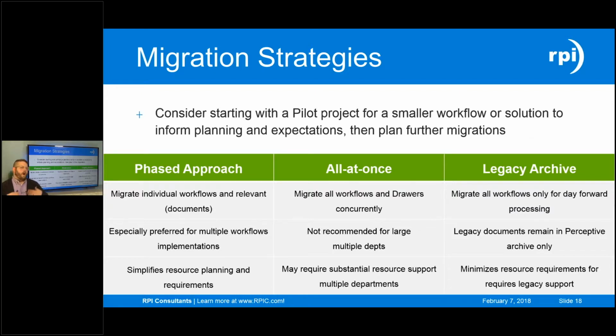So if you are already planning some sort of department expansion, you need to implement accounts payable in your organization, this is a good opportunity to implement OnBase instead of your legacy platform and therefore get everyone used to it. Now, the downside is that, of course, the longer you go with that legacy system in place, your IT and infrastructure is now supporting multiple systems. So there's risk there as well.